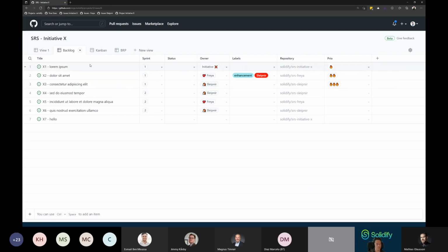So, moving back to my backlog. What I've done here is I have my backlog, I have my different items here. Because we have multiple teams who will be working together to deliver something, I introduced this custom field, sprint. This is the target sprint. When do they think they will deliver these different items?